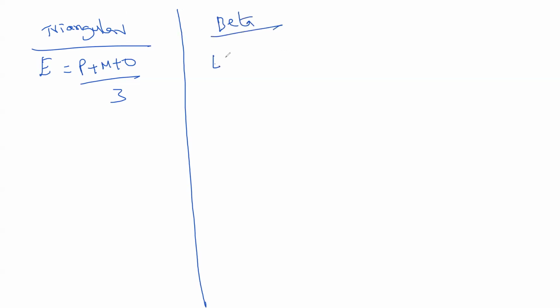On the other hand, we have also beta distribution. As per beta distribution, expected duration or expected cost is pessimistic plus 4 times most likely plus optimistic, divided by 6. This is a weighted average, so the most likely time has higher weightage.